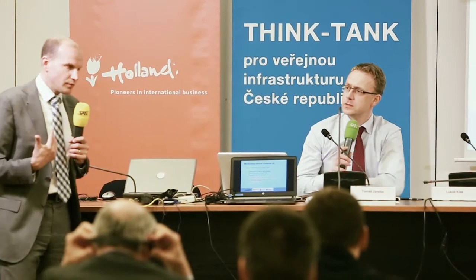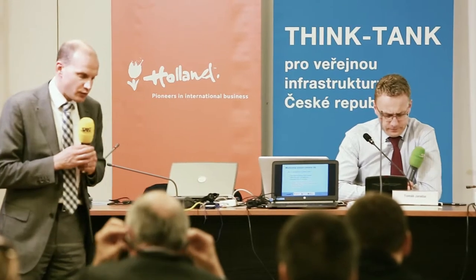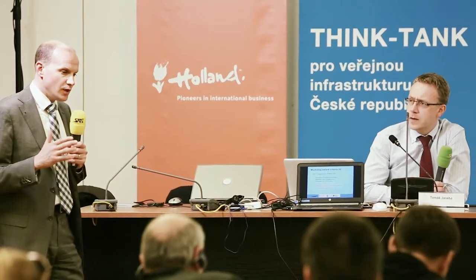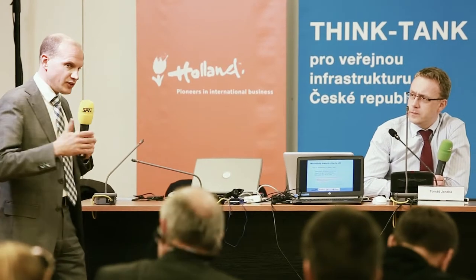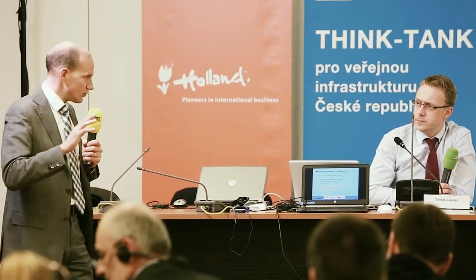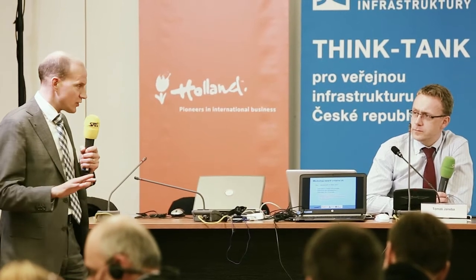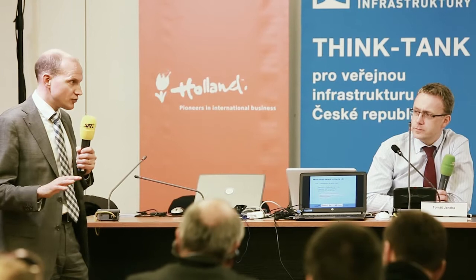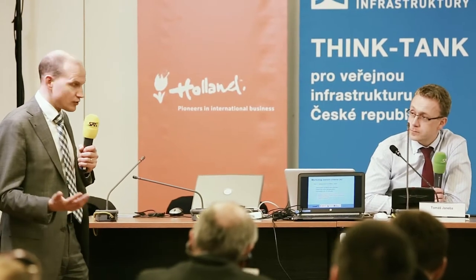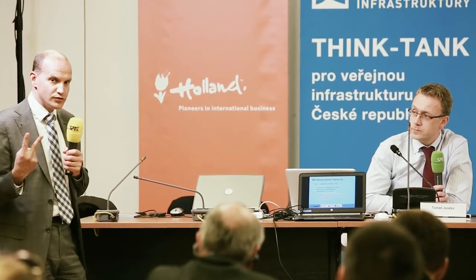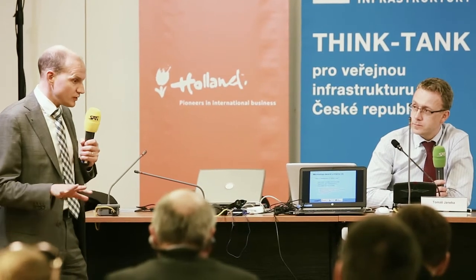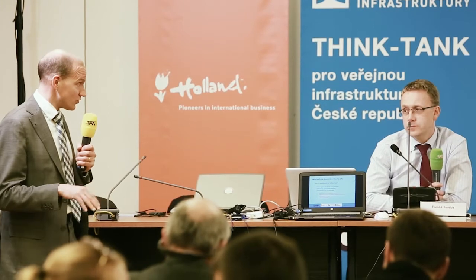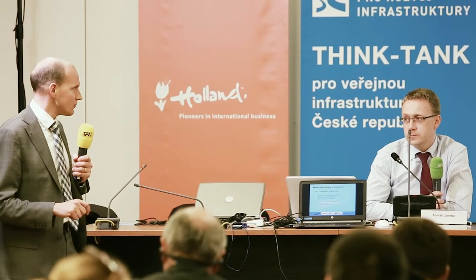Okay, if I look at my agency, for all the new build projects, above, as I explained, the 65 million euro, we go PPP. And below that, everything is design build. So that's the only thing we do. Every contract we tender is a design build or a design build finance maintain. So we only have these two contract forms. We completely quit from one day to the other. We quit with the design bid build. We just said we don't do that anymore.